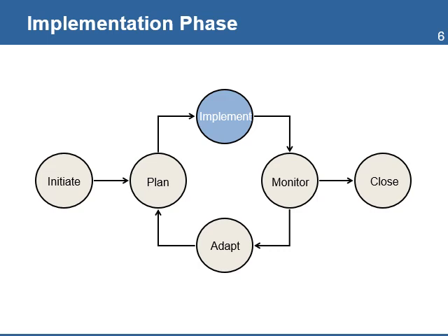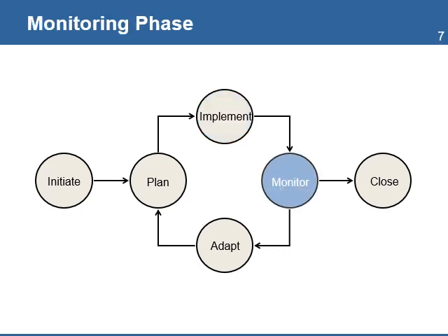The focus of this phase is to measure the progress of a project against its objectives, looking at deviations from the plan and analyzing the results to take corrective steps to put the project back on track. Monitoring includes the progress the project is making in achieving the targets for each objective defined in the log frame, and that requires the process to collect data from the beneficiaries on each one of the log frame indicators.